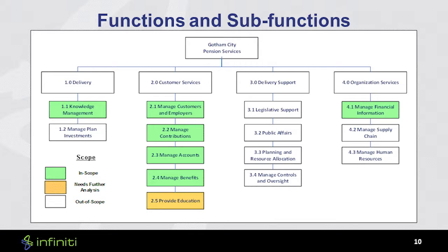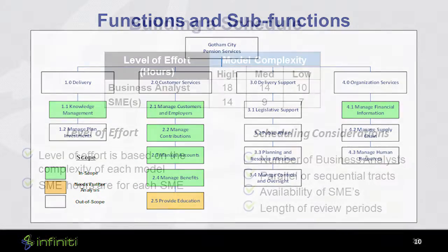And we showed them this functional hierarchy diagram. Clearly, you could associate the functions with the systems that support them. And we said, this is the scope of the system, and that one is not in scope. Ironically, that triggered them to go back and reevaluate the scope of the project because they felt they might have missed something or left something out. So that's a very practical use of a document like this, and an example of how it keeps everybody on the same page and how you can update it when the scope of your effort or your system changes.